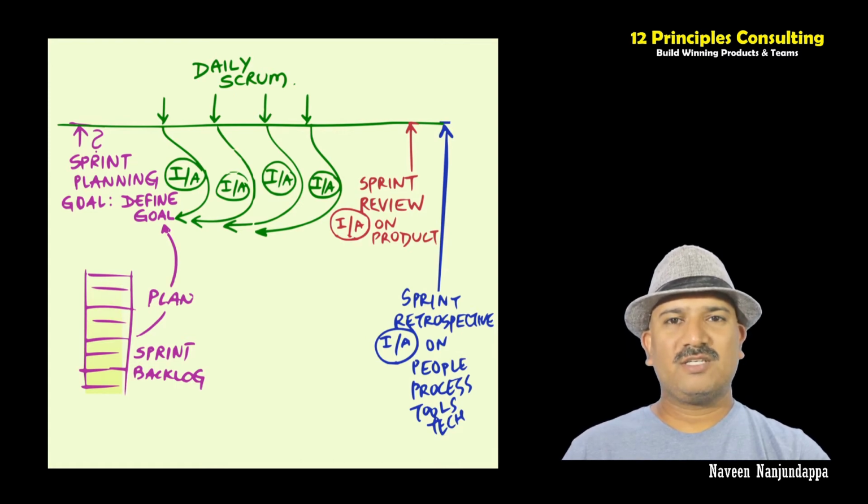There are various tools and techniques that one can use during the retrospective. The Scrum Master can make the retrospective really interesting and transparent for everybody to focus on continuous improvement. Held on the last day of the sprint, this is a 3-hour discussion for a 1-month long sprint. While the sprint review is 4 hours for a 1-month long sprint, sprint retrospective is a maximum of 3 hours for a 4-week sprint, 1 month long.